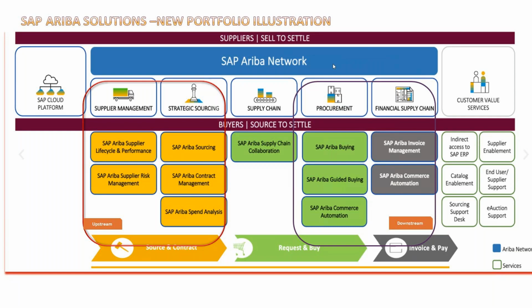So they will face a lot of issues again. Before go live itself, we have to inform the client to share with us all their legacy vendors, because in the legacy system there may be so many suppliers, but they don't want to use all of them. So we cannot export directly from the ERP system. We will ask them to export the data and let us know exactly which suppliers they want to onboard in Ariba.